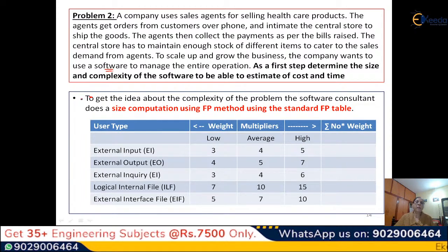As a team member, or as a project manager, what you will do is use the FP method, because here you are told about the functions that the software will do. It is very difficult for you to go into the work breakdown, you have not done enough work to do it, there is no clarity. But some amount of idea is there about the functions and the features. So you do the top-down approach. So you use the FP. Instead of COCOMO, you use the function point.